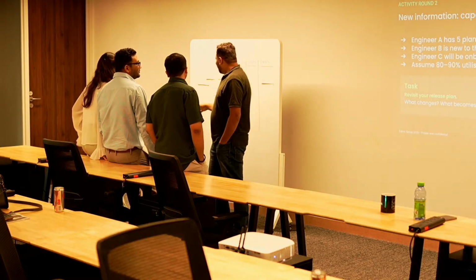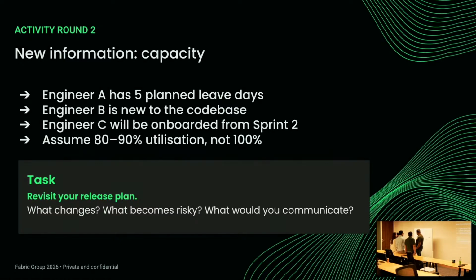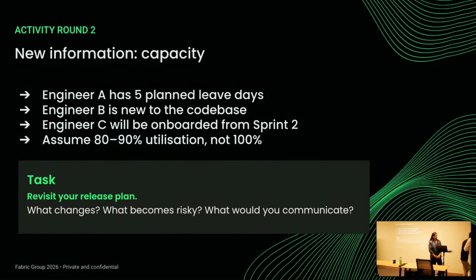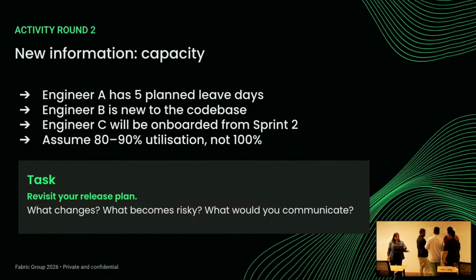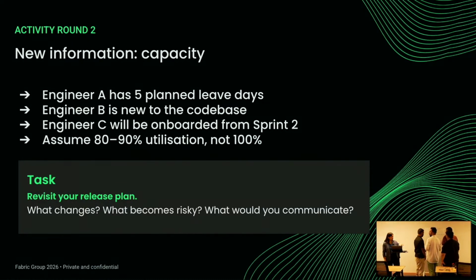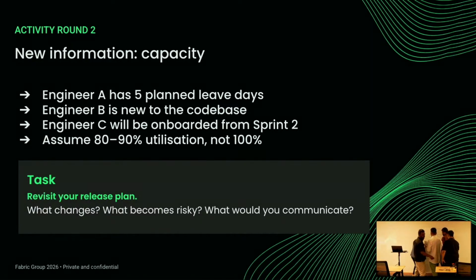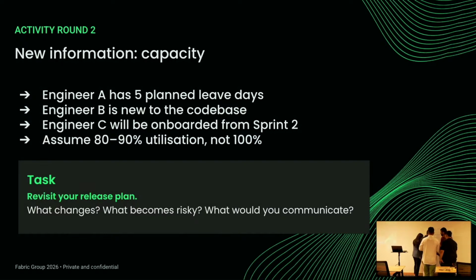So think about how the velocity of the team will change. In sprint 1, what will it be now? So it's like 5 days gone from the sprint for the leaves. We had considered 30 points. Okay, now can I get the marker? Let's write it down. So we had said 30 points. Now let's consider that this is man days. There are a lot of different ways of estimating story points, but for the simplicity of it, let's consider those are man days.